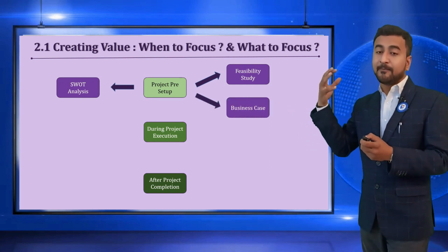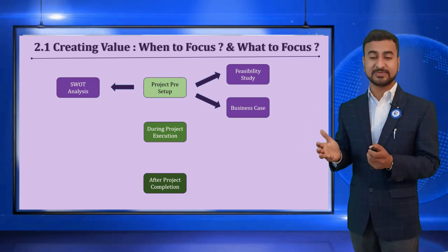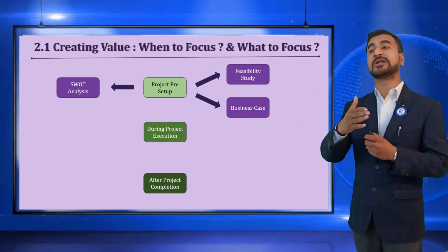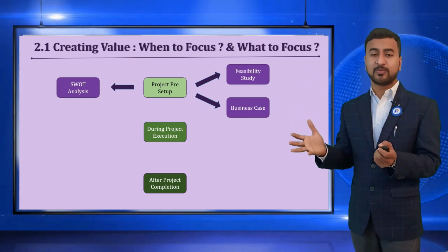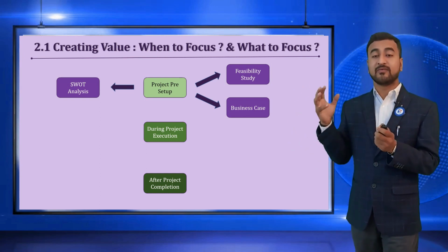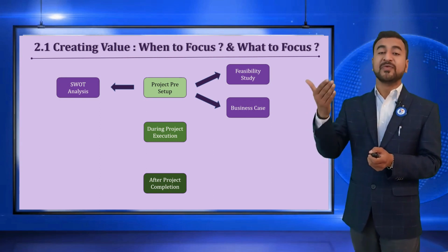And then the business case. In the business case, you do all the detailed analysis: what is the cost required, what is the benefit, what is the return on investment, what is the payback period for this particular project, whether to invest or not to invest. These all are required to be discussed and understood in terms of value delivery before you even start the project.